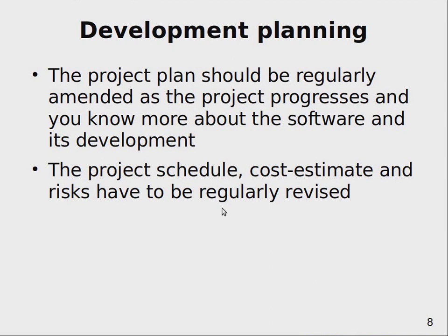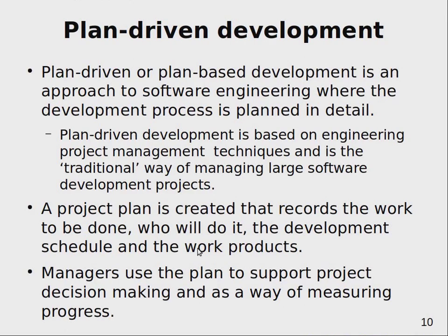And as soon as your plan is a little bit longer than 1 or 2 or 3 weeks, what actually happens is that if you do this plan in advance, project management approach, then of course you have to review these plans regularly. A good interval for regularity is approximately once a week, whatever you like, Monday or Friday. Then you check what has been done so far and what your progress is according to this initial plan.